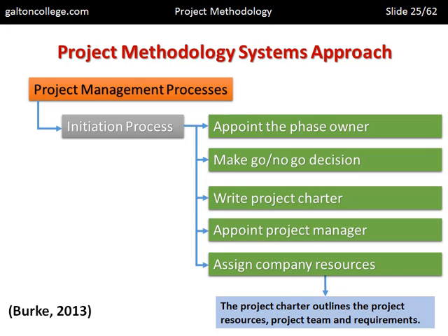Of course, the charter will also set out the resources required. It's important that the project team and their requirements, as well as the resources of the business, the space within the business, the capital equipment, the training for personnel, the additional employees perhaps, all of these must be set out. And once they have been set out, and once they've been signed off or agreed to by management, then the project can start. Before they've been clearly set out and discussed and justified, they will not be signed off by management. So that needs to happen before the project will start.